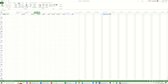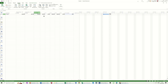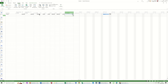If I put that back to Monday the 5th, you can see the changeover — I've spent £80 and I haven't got any issues there. But if I push that forward, that should now be 40% complete and it isn't, so it's saying minus 80. If I put that to 40%, which is where it should be, that goes back to zero and we've spent £160, which is exactly what we should spend based on the baseline plan.